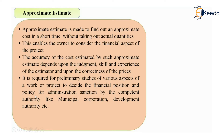You can prepare or form policies for administrative sanction. Administrative sanction is given by competent authorities like municipal corporations or development authorities — this concept we will see in next videos. Technical sanction or technical approval can also be obtained by the competent authority. Simply put, approximate estimate is a procedure to find out the approximate cost of a building or structure in a short time without taking actual quantities.